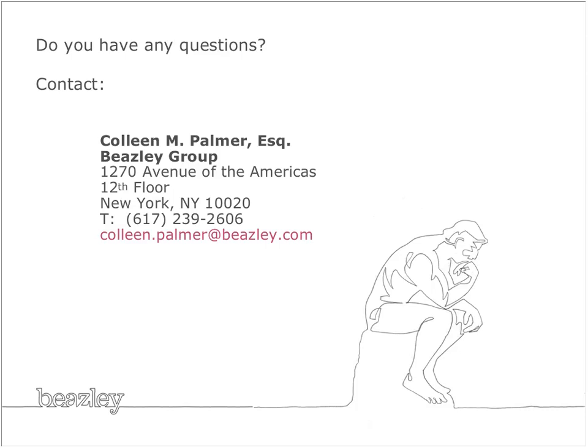Now, in the case where you are retaining a sub, and you are in effect the client and your sub is your sub, I would make it just that your sub is going to indemnify you as the client. I wouldn't easily say you're going to indemnify your sub.